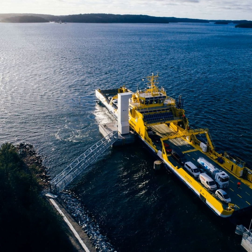Yeah, I can, and we all know about simulation during design, of course. That's one thing about the hull and also the pipe flows, etc. But if you're coming to the build, it's already starting with the nesting. Nesting is the cutting of the first pieces of steel. You can imagine that those are millions of pieces for a big ship. So that's quite complex. But you need to nest and cut those pieces in time. And you don't want to have a whole shop floor with all kinds of pieces which you don't need. So also there you already have the simulation of that construction area, because you have limited space. You've got a lot of parts, but you have limited space.